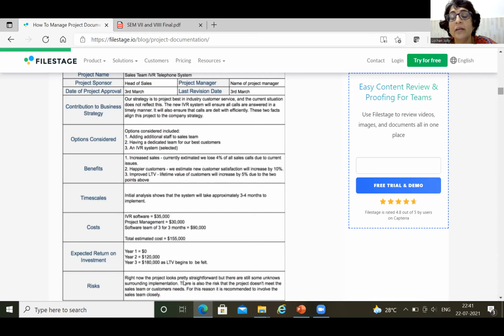There could also be risk with respect to obtaining a license. License acquiring could be a two-month or a one-month process, or getting the right data, and many other things, which may result in your product or project becoming non-functional.